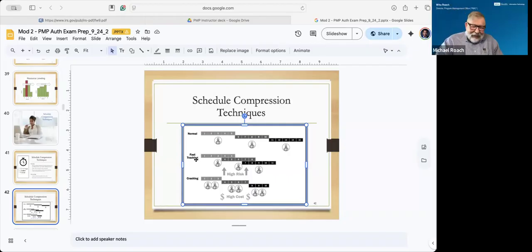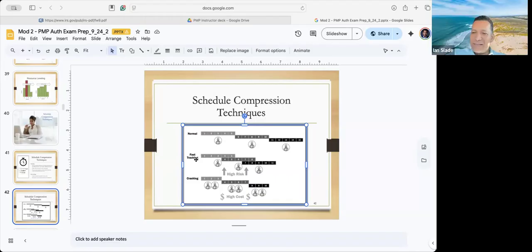Yeah. So imagine, Kenny, that you're on site, and then the first week, Monday through Friday, you're talking to different stakeholders, you're identifying requirements, you're gathering user stories and whatnot. And week 2 is when we start to build based on the requirements we got from the previous week. But since leadership said, hey guys, we don't have the 15 days to do this, we need to speed things up. And so after 3 days, so now it's a Wednesday, right? You're meeting with people. You're still meeting with them on Thursday, Friday to gather requirements.